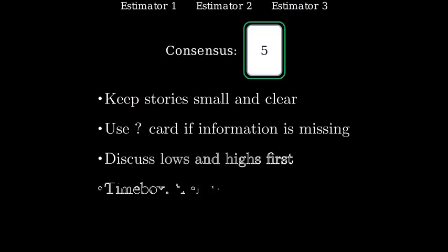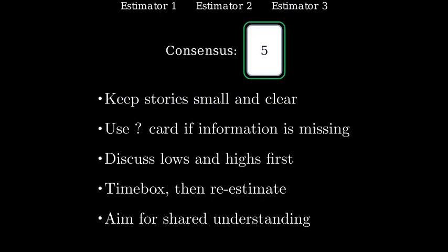Tips for better sessions. Keep stories small and clear. Use the question mark card if you need more info. If estimates are far apart, let the lowest and highest explain first. Timebox the discussion and try again. Remember, planning poker is about shared understanding, not exact prediction.